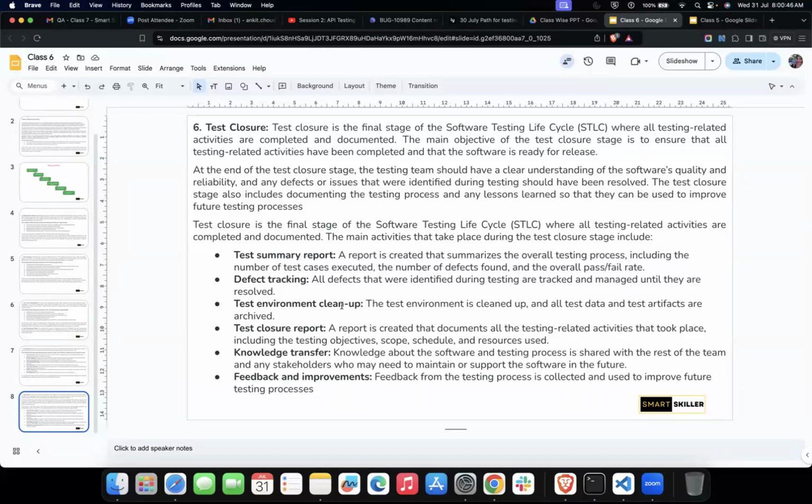And how exactly were we able to follow that schedule, strictly or not? What was the original resource estimation, and what were the resources that we actually used? The reason for this closure report is for the management to understand whether from next time we would be increasing or decreasing the resources.